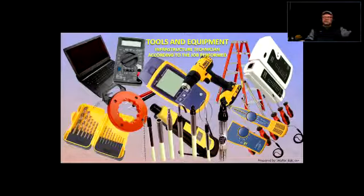because sometimes, when installing conduit raceways, the contract is going to call for stringing them. All right, so you might have a request of installing a conduit, and they all have to be strung. What that means is that every single conduit is going to have a string in it. So if somebody wants to pull the wires through it, they have that string already provided for you, right?